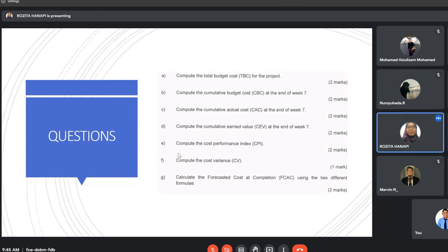So we have 815,500 minus 903,000. Okay, so the answer would be negative 87,500.